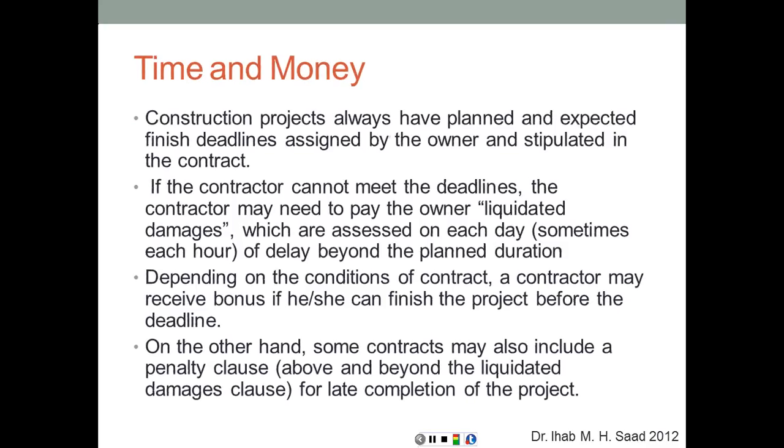So the basic principle here is talking about the relationship between time and money. So far we have learned about cash flow management, but today we need to talk about, once we have developed a schedule, if the project, for example, is behind schedule and we have huge sums to be paid in liquidated damages, how to avoid paying these liquidated damages. This is going to be achieved through accelerating the project.